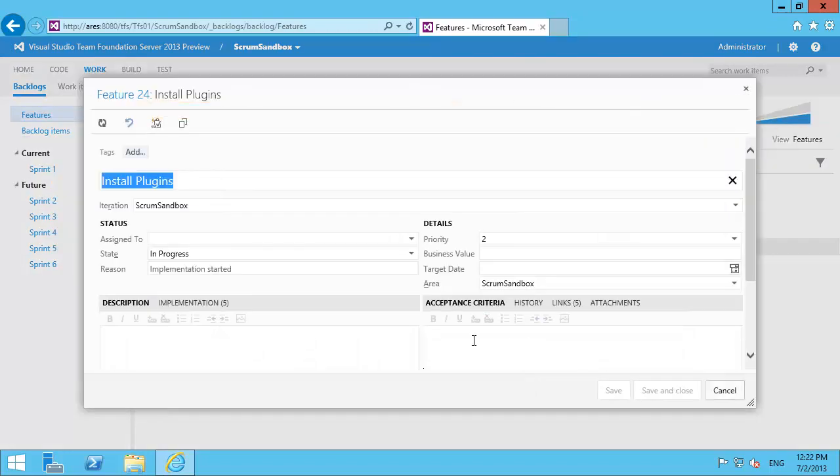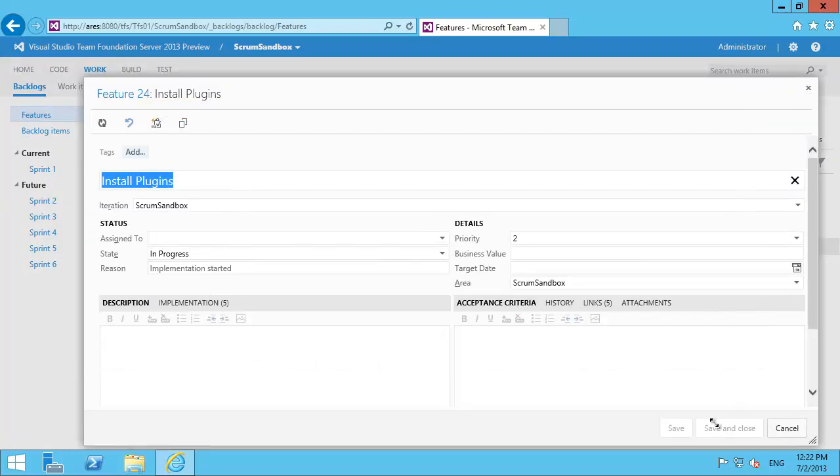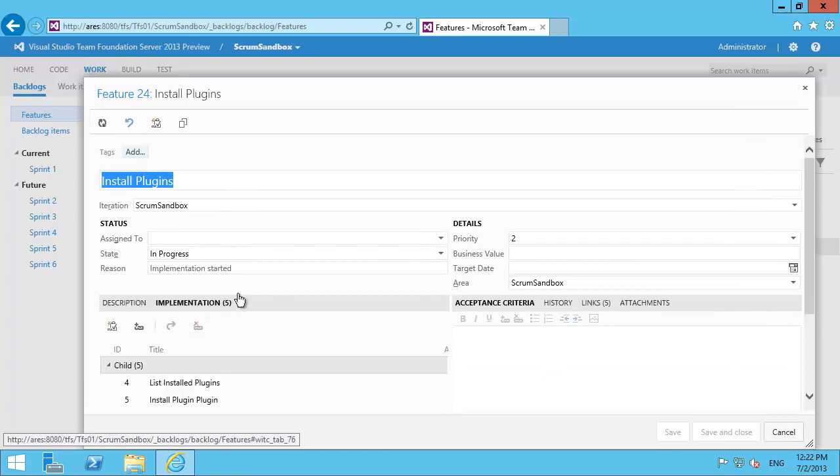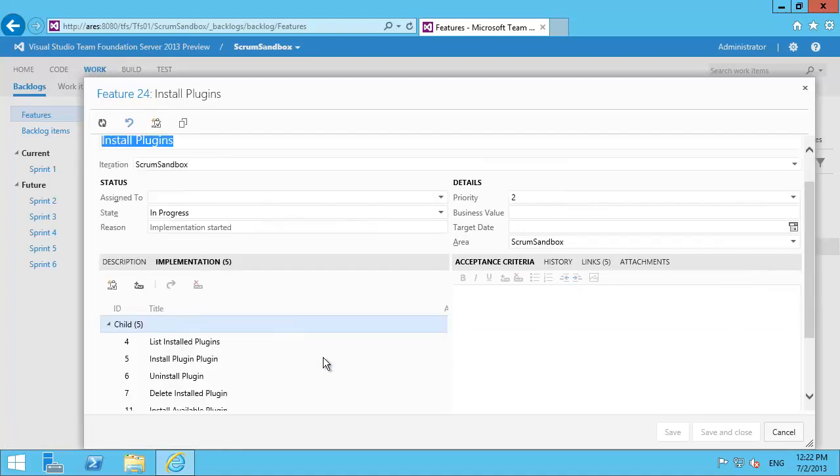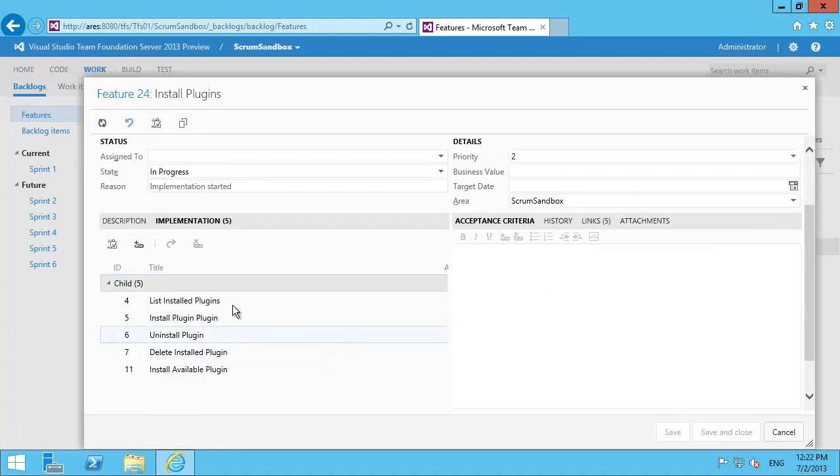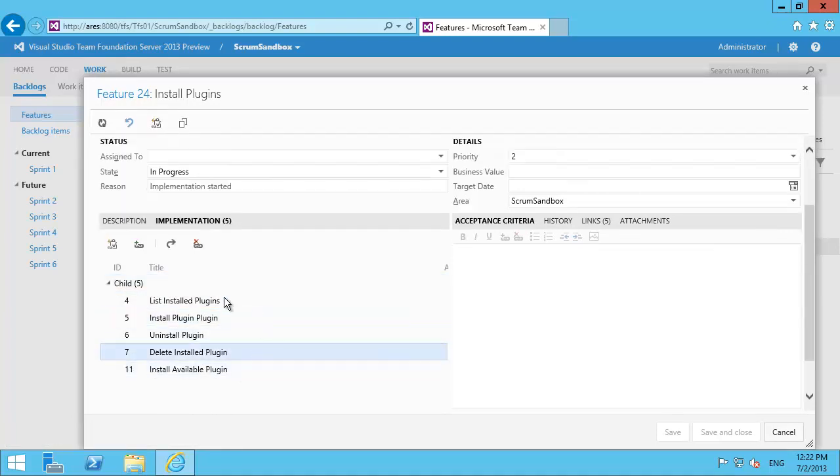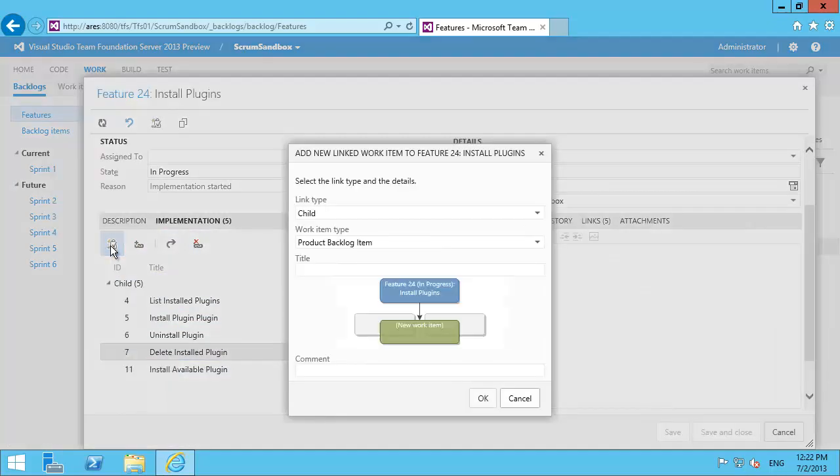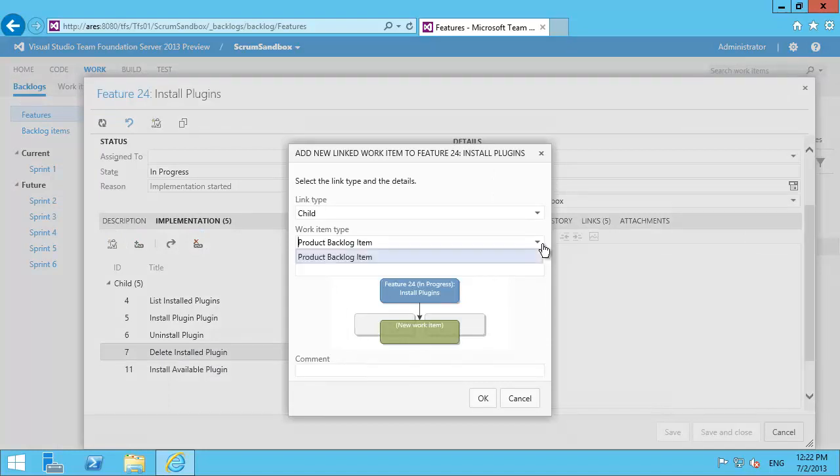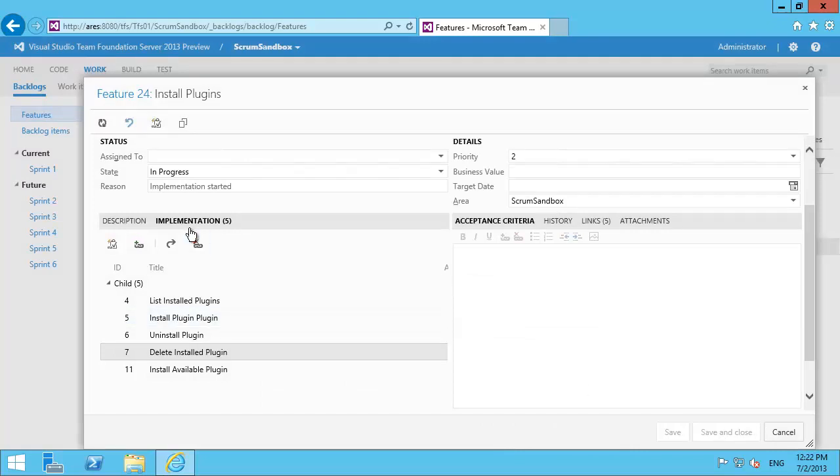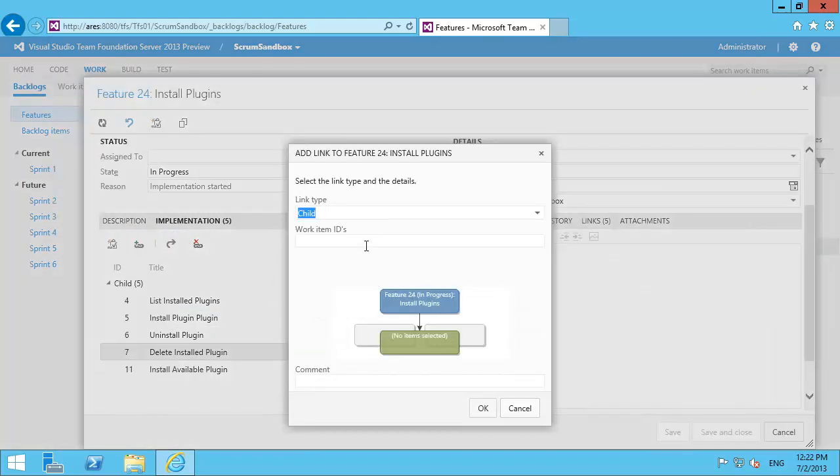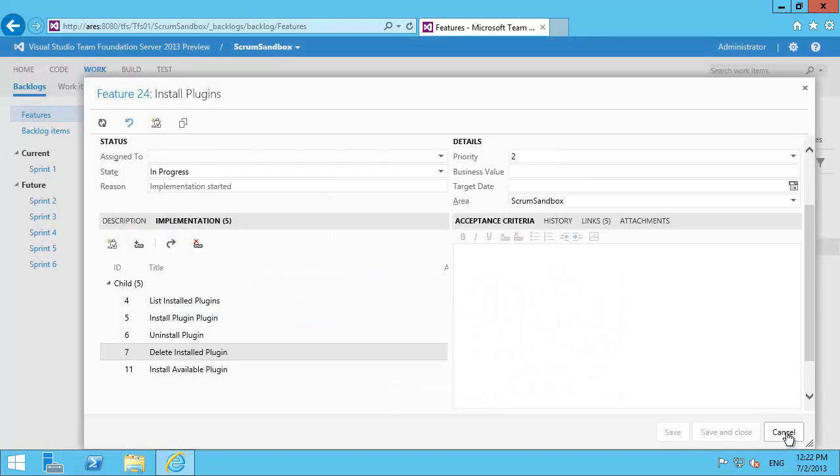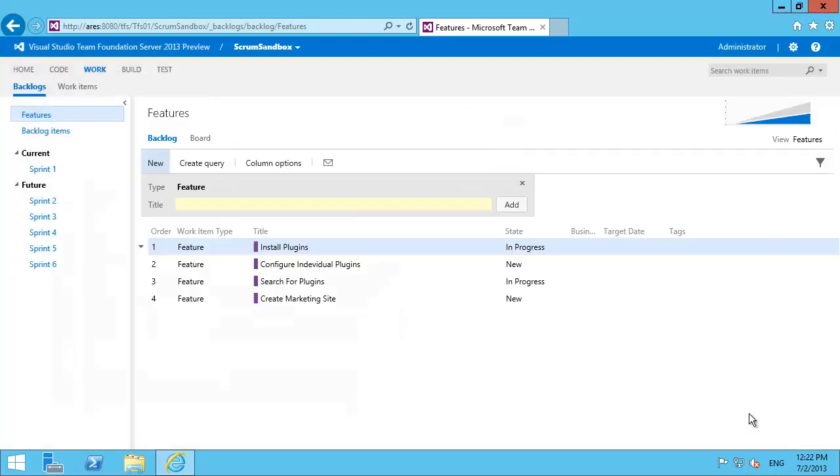open a feature and when I've got a feature open I actually get an implementation tab here. And I can see the backlog items that make up this particular feature. I can add new items just by clicking the new item button and I can pick a backlog item and create new backlog items from there. Not only that but I can just link to something I know the idea of, no problem at all.